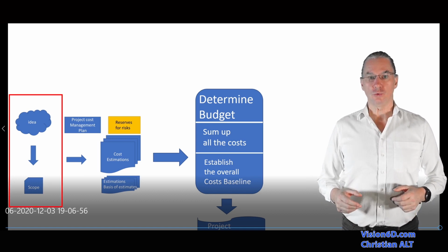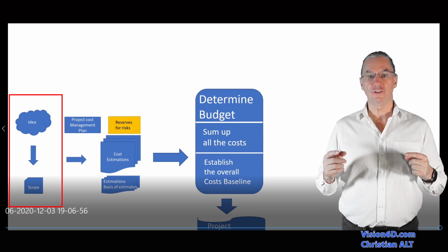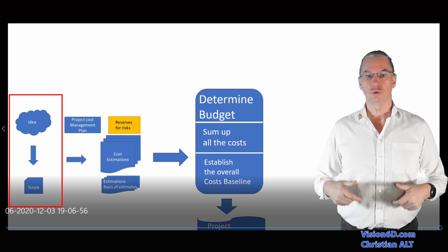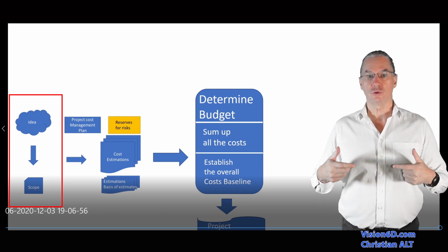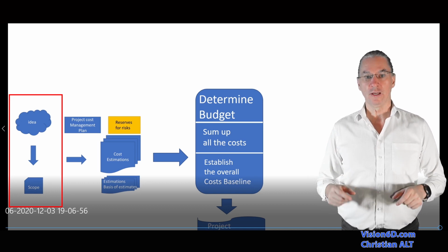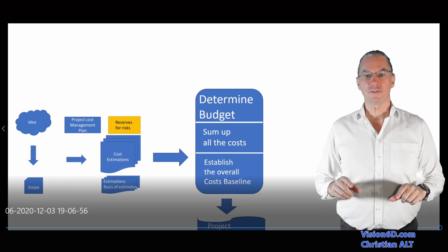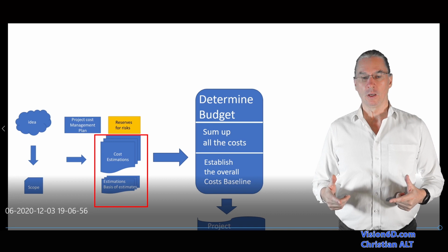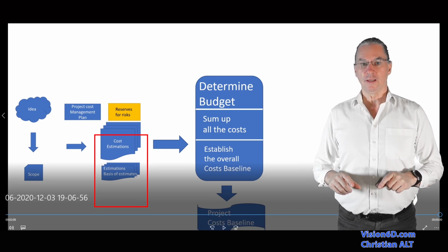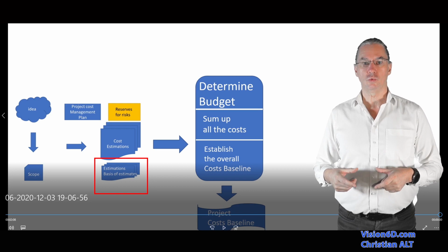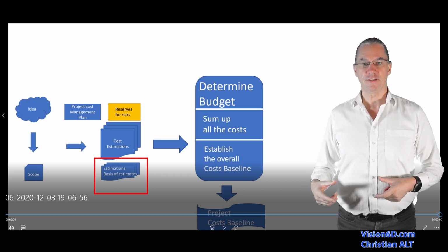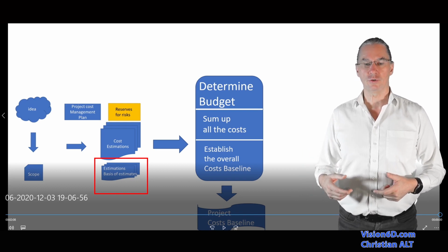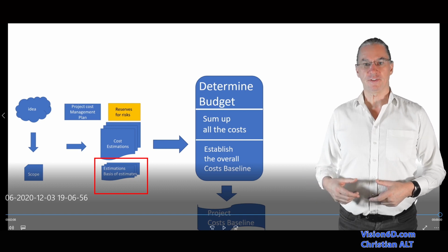In a project, you start with an idea, and then you need to define the scope. The scope is the definition of really what you need to deliver into the project, what you really want in this project. So this is really important. Once this is done, we will go one step further, which are the estimations. Once we have those estimations, they are composing what we call the basis of estimation. It's all the documents that were useful to do the estimations, and we have our estimations.